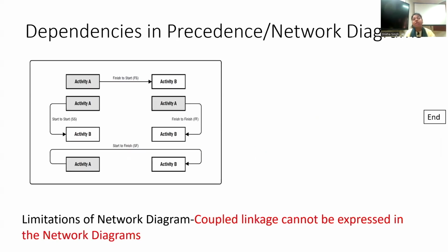In the design structure matrix, we'll be talking about not only the dependencies, but rather arranging them in order. So you can say that prior to the precedence diagramming, we can do the design structure matrix.